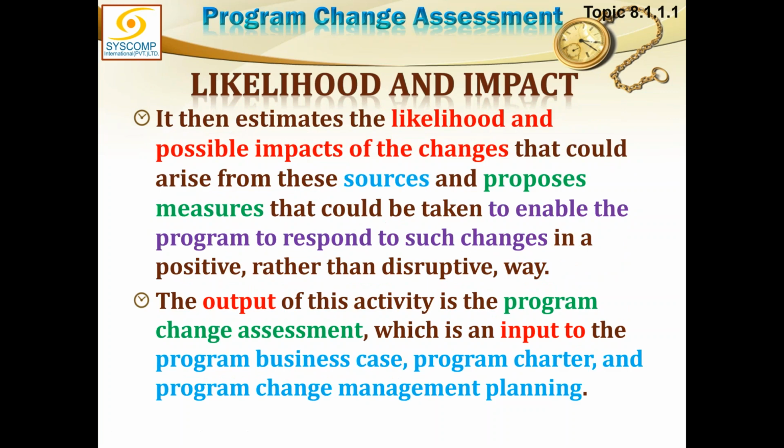It then estimates the likelihood and possible impacts of the changes that could arise from those sources and proposes measures that could be taken to enable the program to respond to such changes in a positive rather than disruptive way. So we do not want to disrupt the program right in the middle when the things are being delivered. So we are laying out a program, laying out a procedure, a mechanism by which the changes can be smoothly brought in to the program management plan. Output of this activity is the program change assessment.